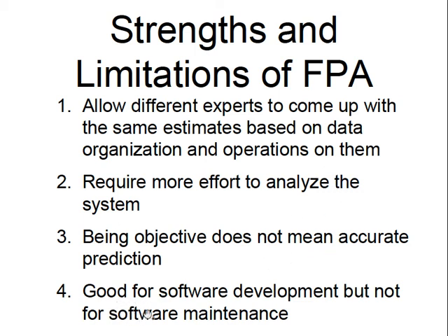Also, it is more useful for software development, but you cannot use it to estimate software maintenance effort, because software maintenance depends on other factors. For example, how well the code was written, and how experienced the person is with programming, with maintenance, and also the maintenance programmer.